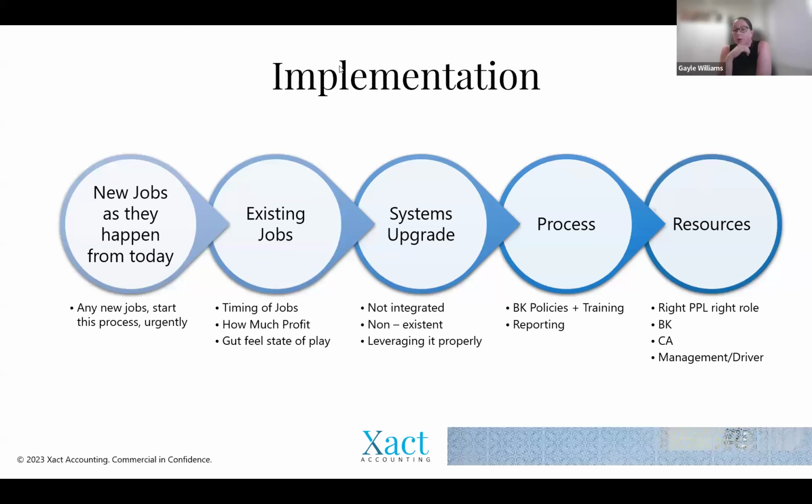You also need to look at your policies and your processes. So do you have any kind of processes embedded with whoever's doing your data entry or your bookkeeping to flag, like, if an invoice comes in without a PO, what's happening in that space? Do they know what they're meant to be doing with it, or are they just processing it? If it comes in and it's over budget, what are they doing? Are they flagging that with you? Is it really just, well, I'll just get this done and then hope for the best? And you're not really having any visibility over it because you're not looking at what's going on in Xero, and you'd rather just leave that for the bookkeeper or the accountant to deal with.